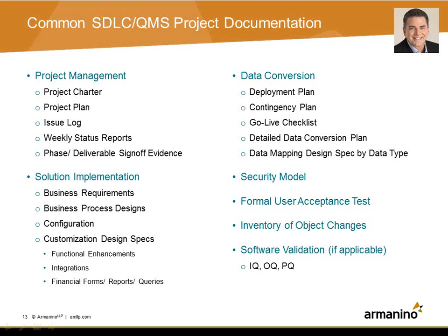And then some level of evidence that there was actual sign-off on things like the requirements or the high-level design or the design specifications themselves, be it an email or something more formal. That's definitely something that's of interest to them. Then, of course, the solution itself: requirements, the configuration, any customizations via interfaces or forms or actual functional enhancements will definitely get more scrutiny than the, quote, standard configuration.